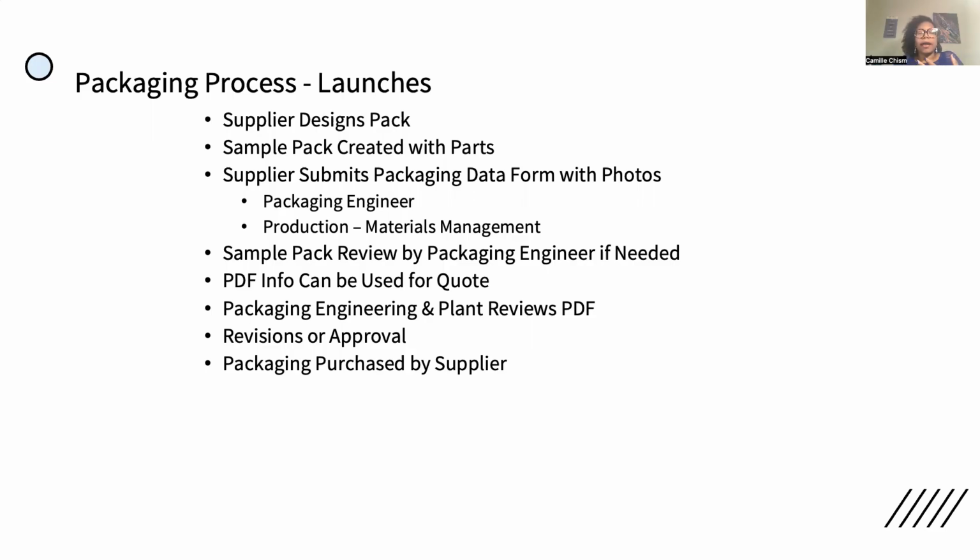This is the part, this is the pack, this is the price it's going to be. Because if they say the pack is going to be 10 cents, but then you find out that it's not protective enough and you have to make some changes to make sure that the part is protected by the pack, maybe now the pack price goes up from 10 cents to 20 cents. So now they're spending twice as much per part on packaging than they planned. They've said, okay, this part is going to be $1 and 10 cents of that is packaging. Now all of a sudden it's going to be $1.10 because you've added 10 cents to the price of the packaging. Just some examples.